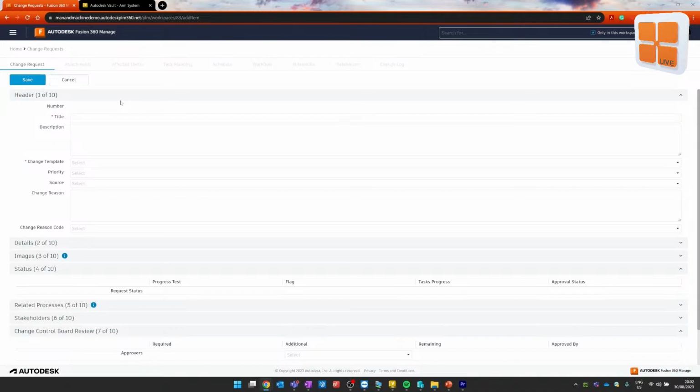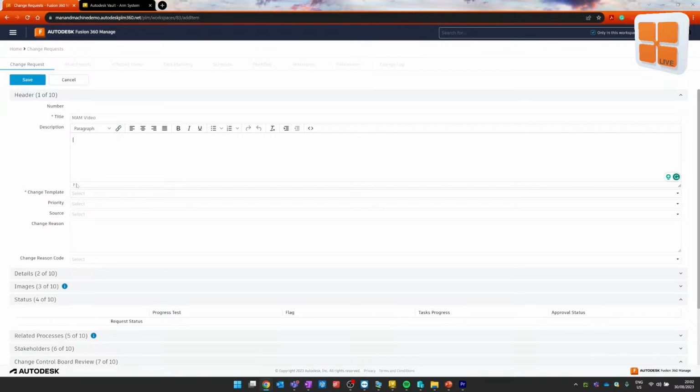So by clicking on that little plus, we can go ahead and create a change request. And this allows us to go and give it a title. So let's go and say machine video. And we can put a description in here. Then we can select a change template. Now your change templates kind of dictate what path this is going to be, who's going to be involved in the change control board. That kind of thing can be set up as part of the configuration. And then we can choose what priority this might be.